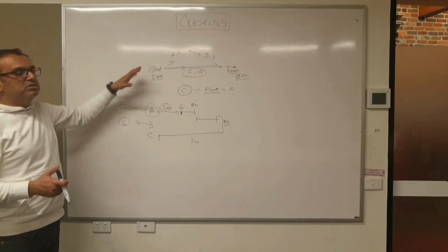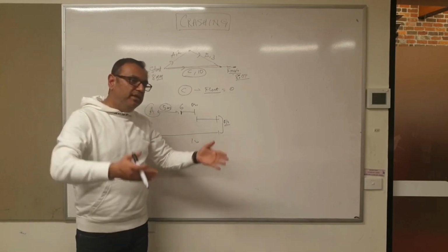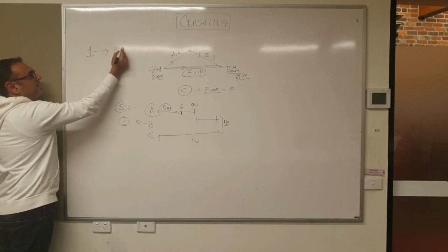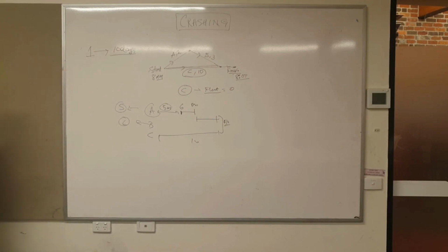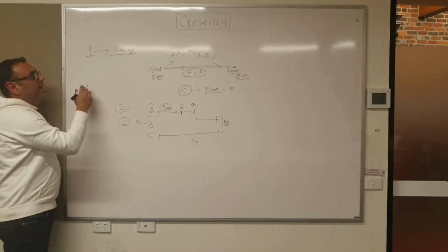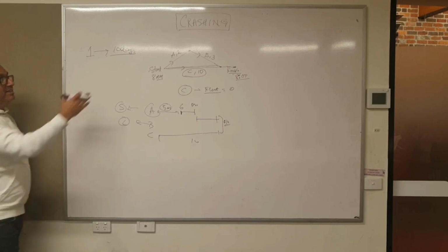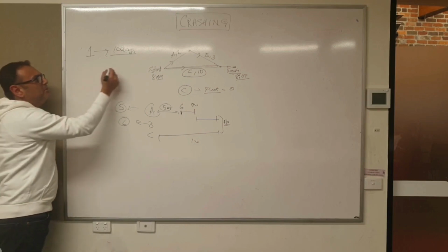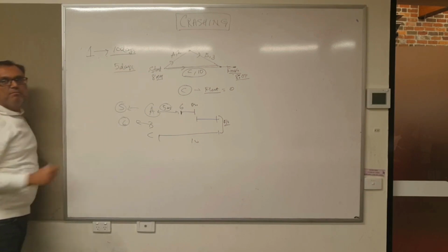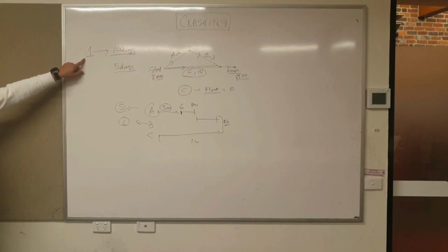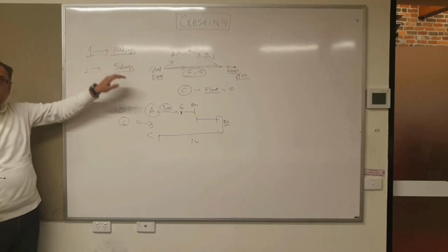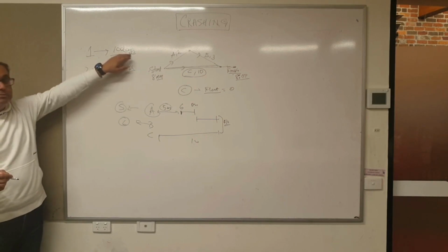Let's say you are digging a hole in the ground, and one person takes 10 days to dig a hole. So that's the critical path. That means you cannot prepone it. That's the maximum you can take out of one person. But if you tell that person, no, I need to do it in 5 days, what exactly do you need to do? You need to employ one more person, right? You need 2 people now, so that they come in together and do the work in half of the time that you were spending earlier.